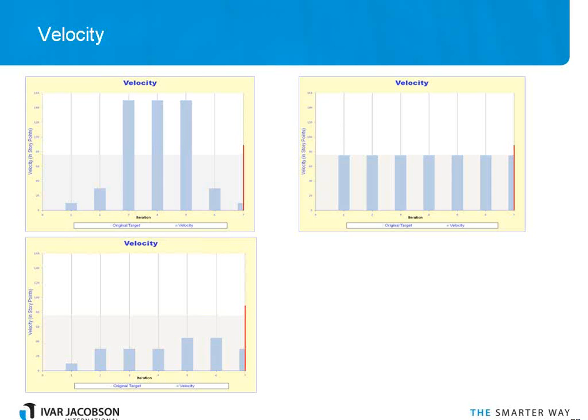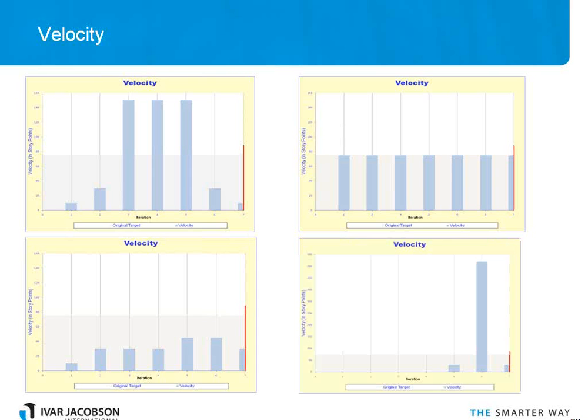The third graph here, this isn't doing so well. Across the iterations, we're never achieving the average velocity. If we don't achieve or exceed the average velocity, again, we're going to struggle to bring in our progress and we'd have to take some action. The velocity, like progress, relies on us having completed things. It's done again in story points.